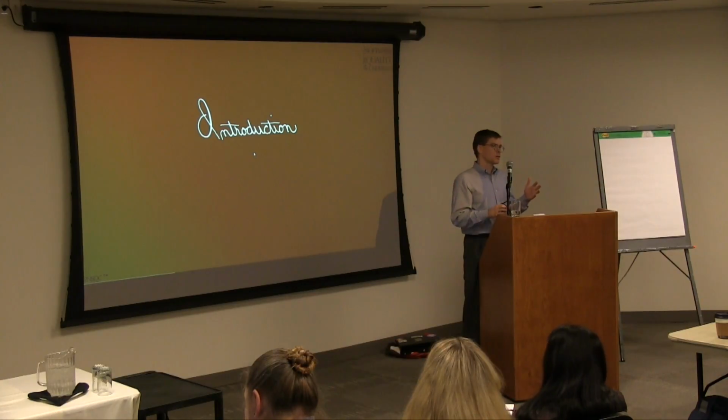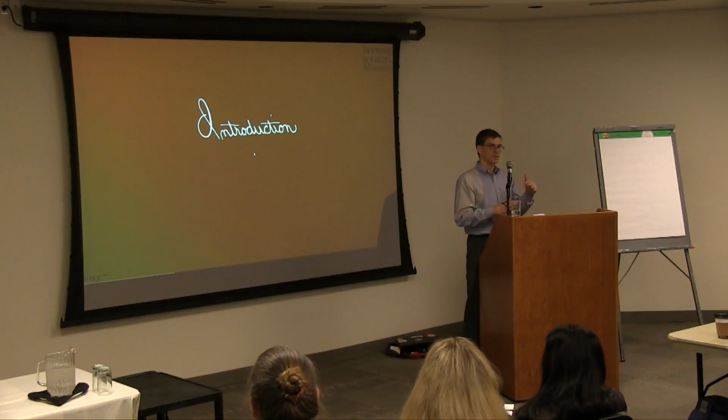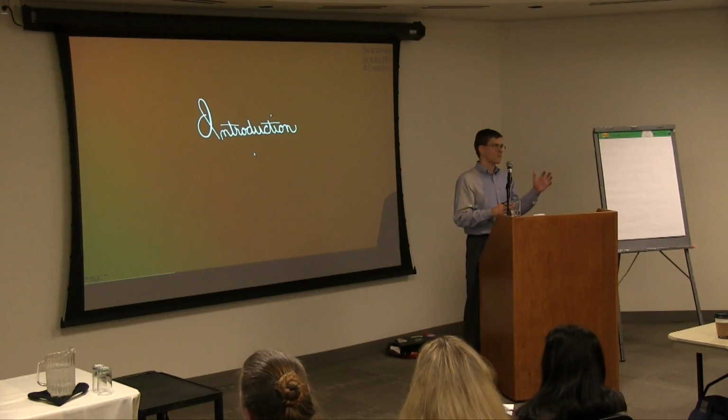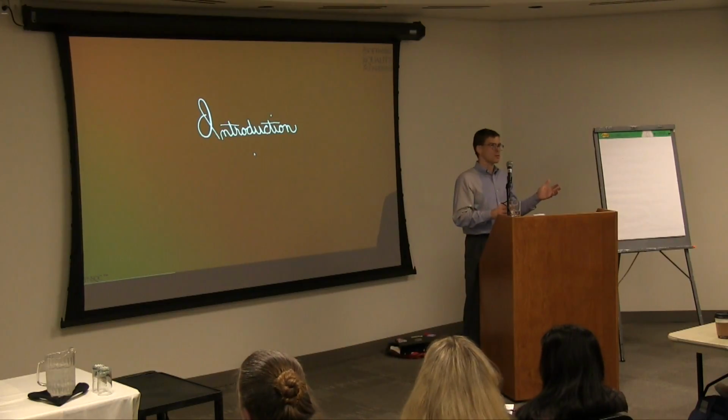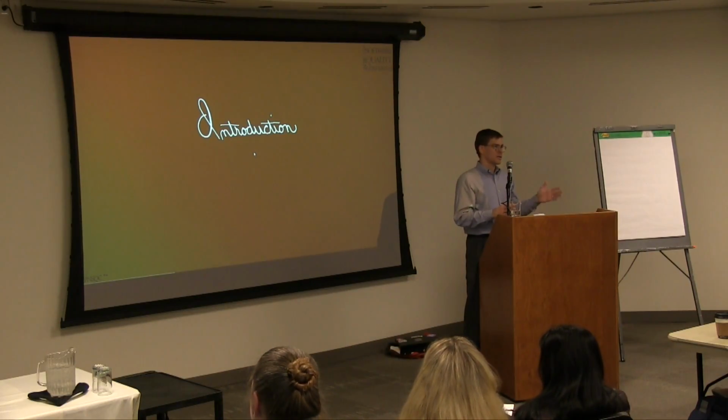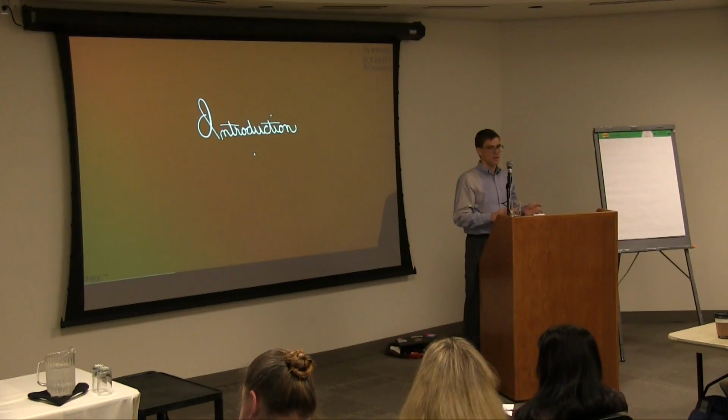Scrum also uses those sprints to capacity plan. So you'll start the sprint with a set number of story points that the team feels it can accomplish over the course of that sprint. Ideally, they would be structured in such a way that the team can continually be working those down to the point where all of the points are completed by the end of the sprint.